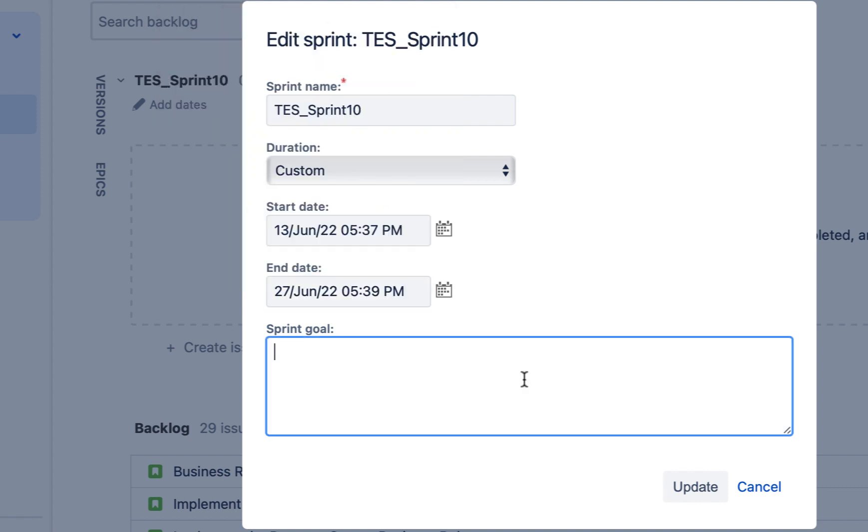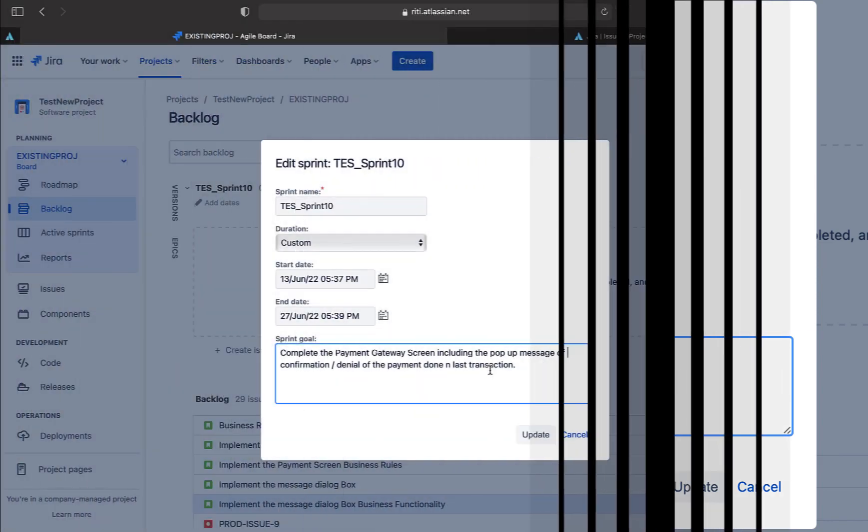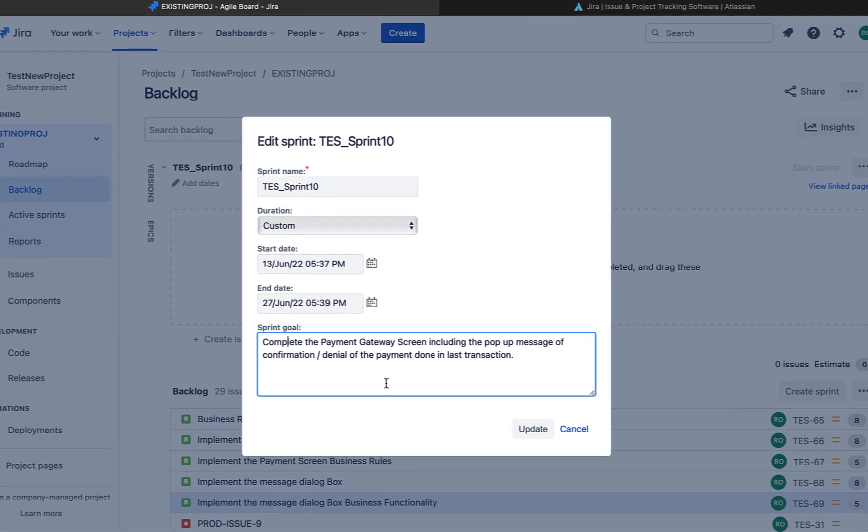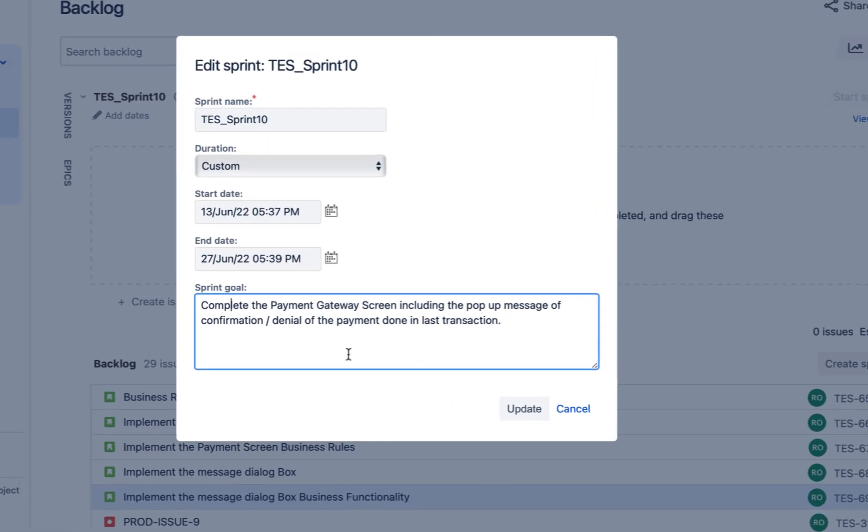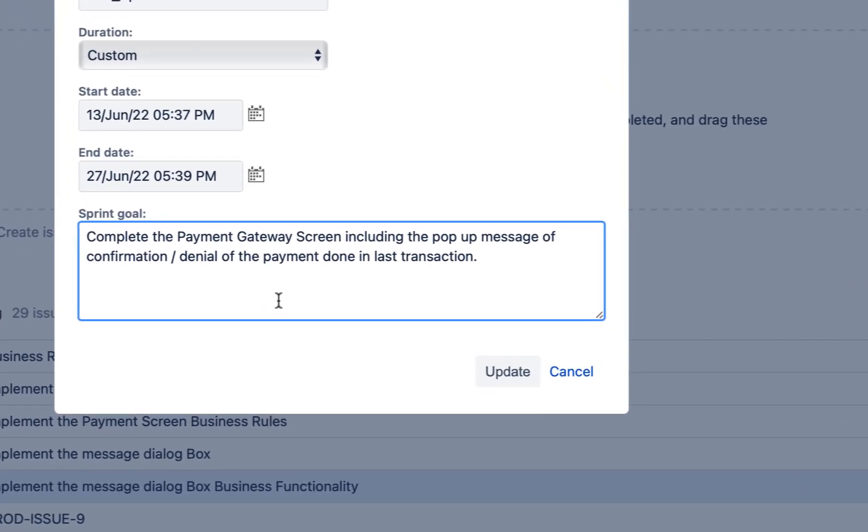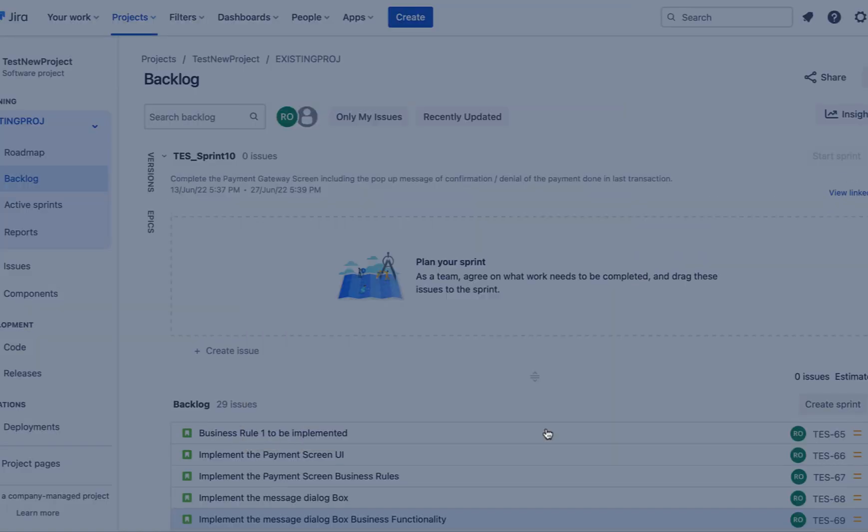Again, no sprint should be created without a sprint goal. A sprint goal should be very clear to the team before starting the sprint and should not be changed once the sprint has started. So I'll just put a valid sprint goal over here. For example, in our case, the sprint goal is complete the payment gateway screen including the pop-up message of confirmation slash denial of the payment done in the last transaction. Okay, let's update it.